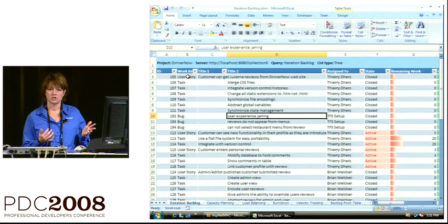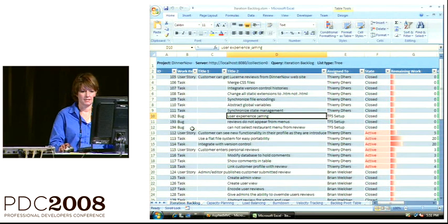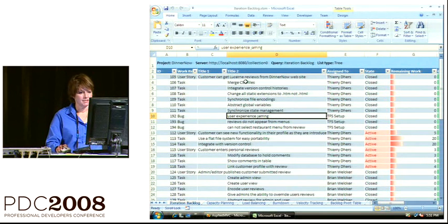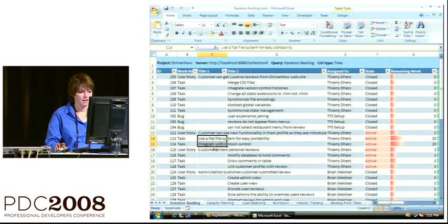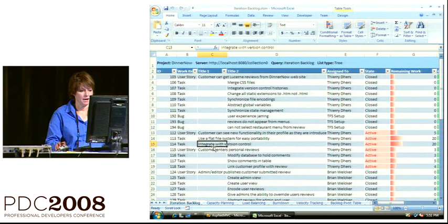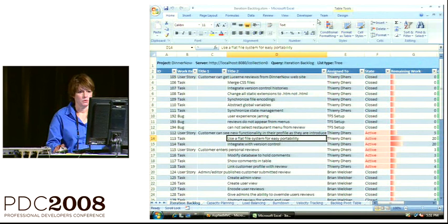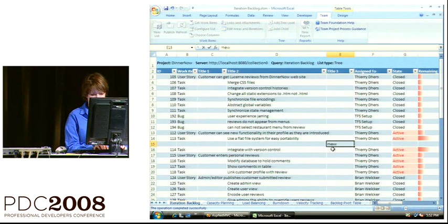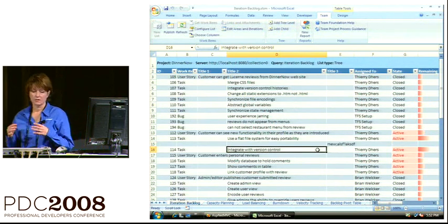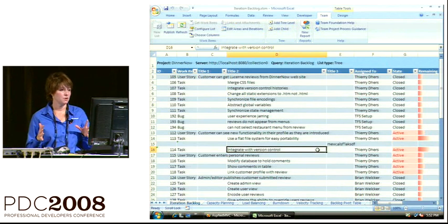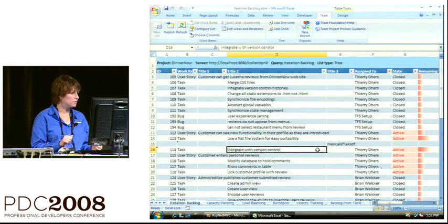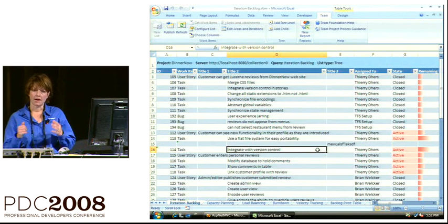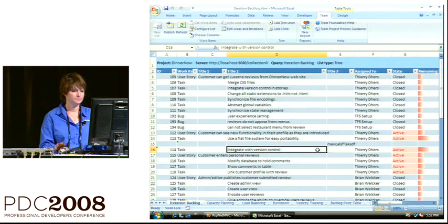It's that same query I just showed you, the user stories and their associated tasks. And I can see how that work breaks down, and it's a nice tree here in Excel. And I can make changes to the hierarchy simply by dragging and dropping and create children of parents, or just like I was showing you earlier, I can create a new child, it'll create a new row there, and I can add that task there. So real simple, in my Scrum meeting, to break down a user story a little bit further or provide updates and really understand how the work comes together to fulfill my user stories.